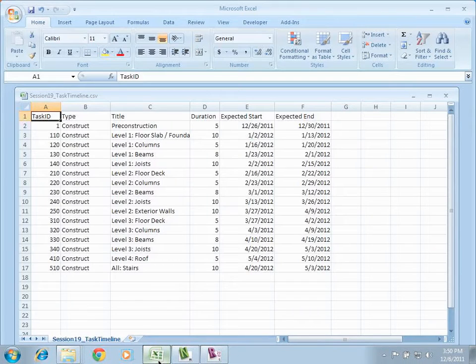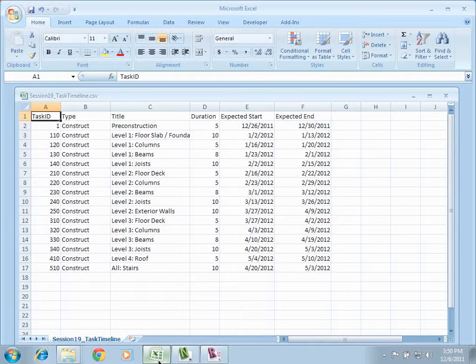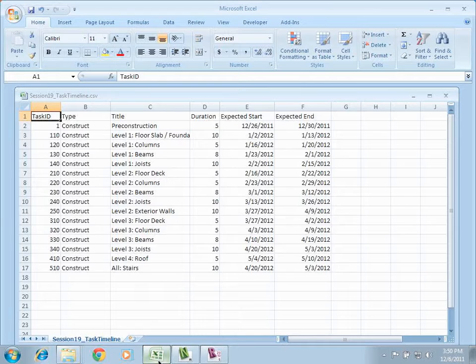And let's think about what a task timeline might look like so we have a target in mind as we do this. I'm going to bring up an Excel file, kind of a very simple little task timeline here, that really just has a bunch of different tasks. It has some IDs. I have some names of the tasks, some durations, some expected starts and expected ends. So if you do scheduling at all, there's a lot of ways you can do scheduling, but it all sort of ends up looking something like this, where you have different activities that we can map to different items in the model. We have durations for them, and based on the durations, the start and the end dates, and some sequencing, we'll sort of figure out if we start in 1226 that we're going to end sometime in May.